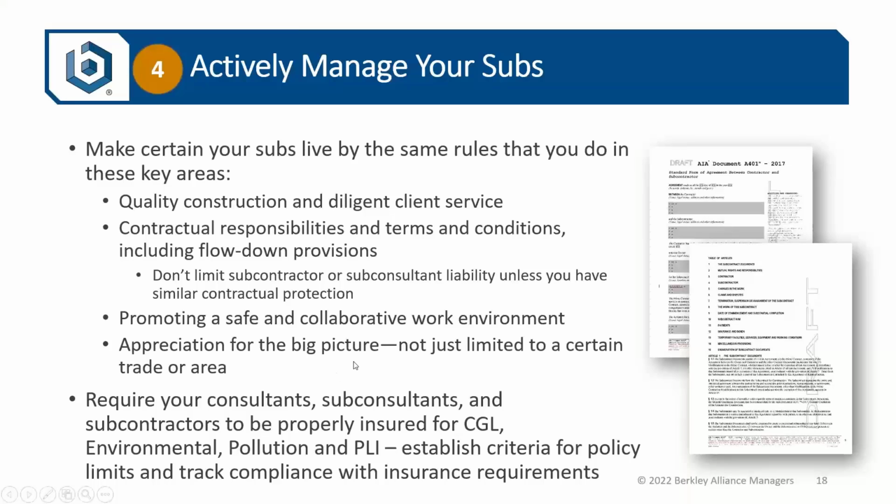Similarly, professional liability. Some contractors don't realize that they do have professional liability exposure. Historically, it's been common for structural steel fabricators and erectors that do the final engineering of structural steel framing plans and erection. Similarly for prefabricated metal stairs, and for prefabricated railing systems, particularly aluminum, steel, and glass railing systems where final engineering and design is done by the supplier and subcontractor. That creates a professional liability.